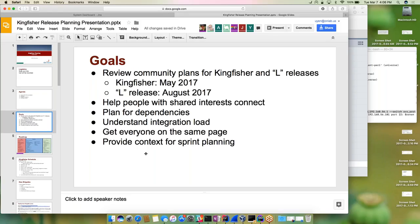The goals of the planning session are to make sure that we review and understand the community plans for Kingfisher and the upcoming L release. Kingfisher is targeted for May 2017 and L is targeted for August. It's a great forum for folks to show their dependencies, help us better understand integration requirements on the platform, and make sure everyone is on the same page. We are doing sprint planning in a couple of days, so this will get us ready for that.